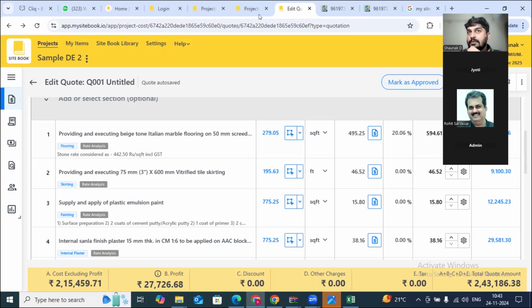Currently, what we do in my build cost is we create these three separate items in the masters and allocate them separately to project directories. Instead of that, if I create a rate analysis alternative only, then the person who is doing the digital takeoff can choose the appropriate floor-wise item and apply it.